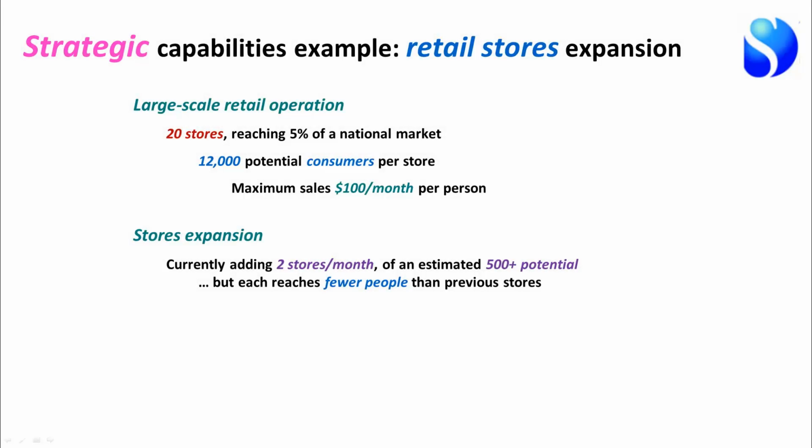At the moment, each new store takes 30 months from the decision to open that store to the store actually being opened and trading. That might seem a long time, but if you think about it, first of all, you've got to identify the town where you're going to open the store. Then you've got to do quite a lot of research about what possible locations there are where a store could be constructed. You've got to negotiate with the local planning people. You've got to find the piece of real estate where the store is going to be. You've got to get the store designed and built, and that's quite time consuming.